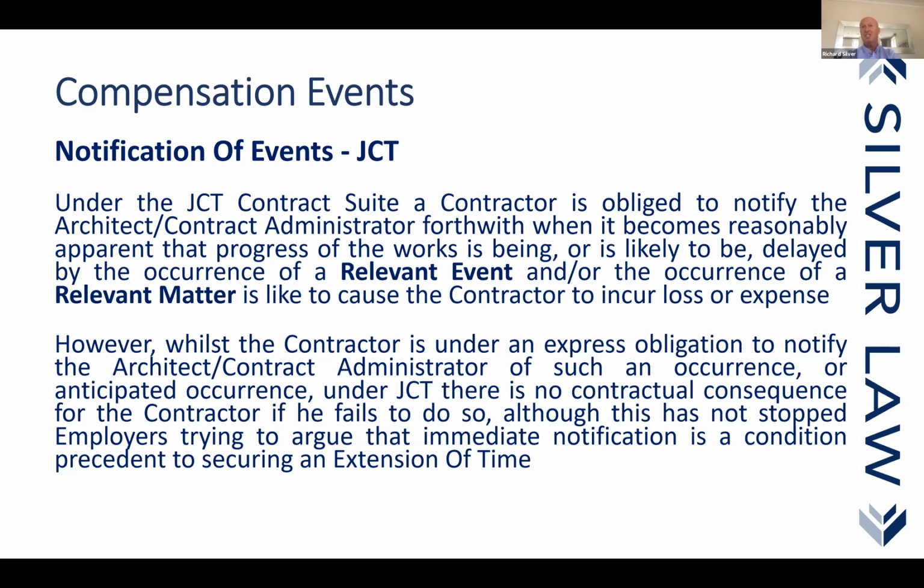The fact that it is a change to the works information, you should also be issuing a compensation event notice. And in view that you have now notified that it is a compensation event notice, you should also be instructing the contractor to submit a quotation. But all too often it does not happen. And upon such basis, the contractor, where the PM has failed to issue a compensation event notice or an early warning notice, the contractor has to do it. So be aware.